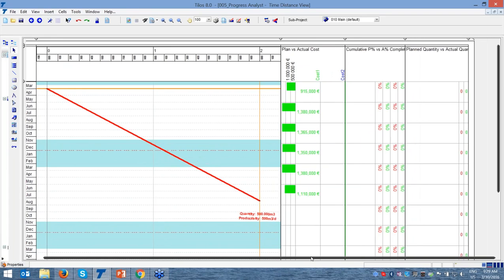On the right side, I have planned versus actual. My goal is always comparing my planned cost and actual cost. Another criteria which I want to measure and control is planned percent complete and actual physical percent complete, so that I would like to compare my progress based on percent complete. But percent complete is very individual.